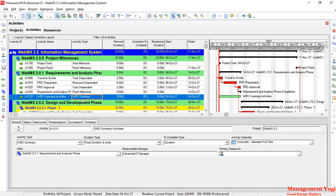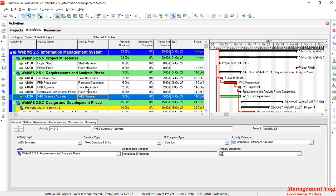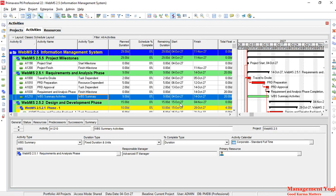The next type is the WBS summary activity. The activity type is WBS summary, and as the name suggests, it summarizes the elements of the WBS with which it is associated. Here, the WBS summary activity is associated with WBS element 2.5.1 Requirement Analysis Phase. All elements under that WBS are summarized by this activity. The duration is nine days, the start date is the 4th of October, the finish date is the 14th of October, and the total float is 20 days — matching the underlying activities.